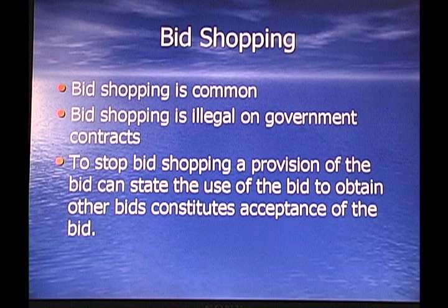Bid shopping: bid shopping is common. Bid shopping is illegal on government contracts. To stop bid shopping, a provision of the bid can state that the use of the bid to obtain other bids constitutes acceptance of the bid. You can try it, it probably won't work, but this is what is suggested in the contractor's manual, and I'll pull that out in a minute.